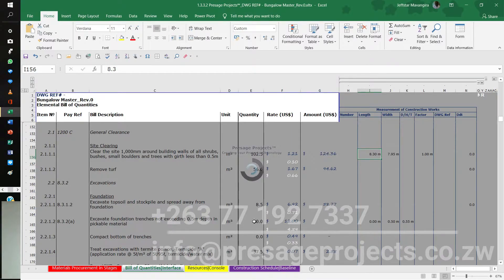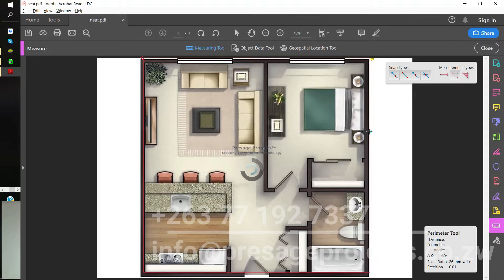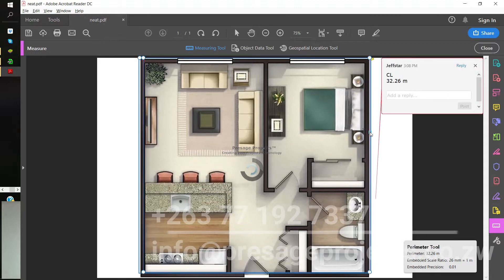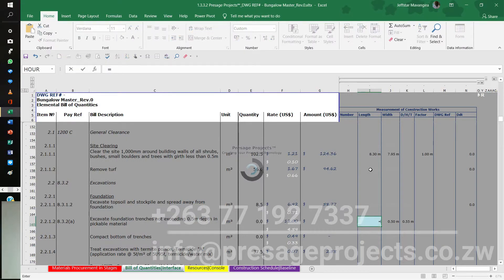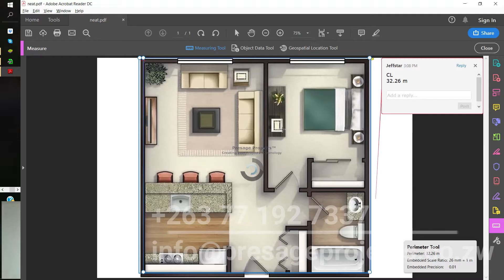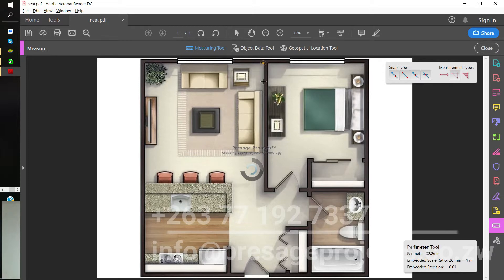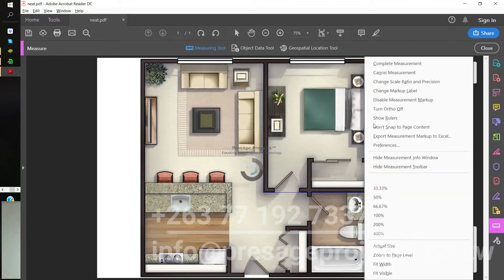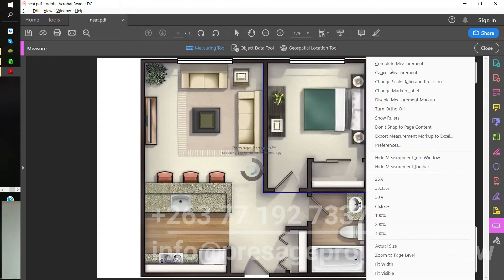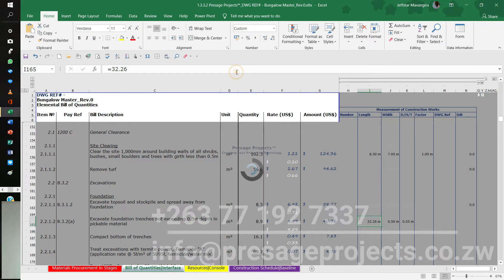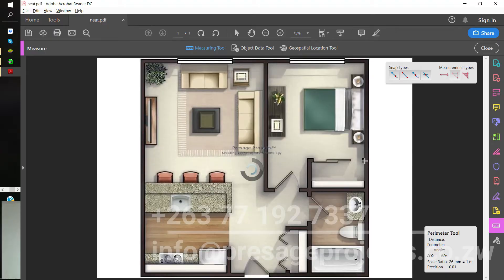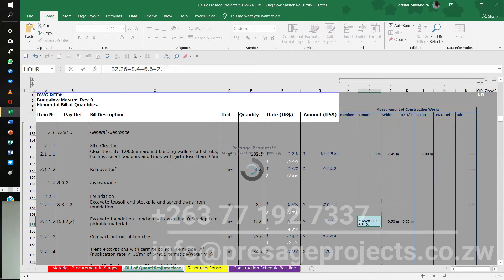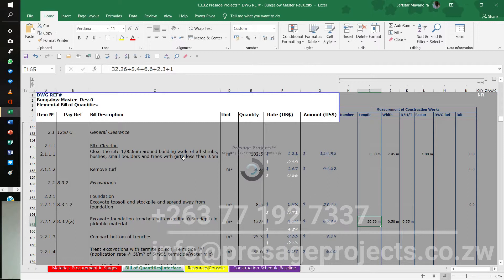The next part is the trenches. The trenches section has already established the perimeter at 32.26 meters around the building wall. I enter 32.26 as the first measurement. I then measure the internal walls — there's one wall at 8.4 meters, plus 2.3 meters, plus 1 meter, giving a total of 50.5 meters.